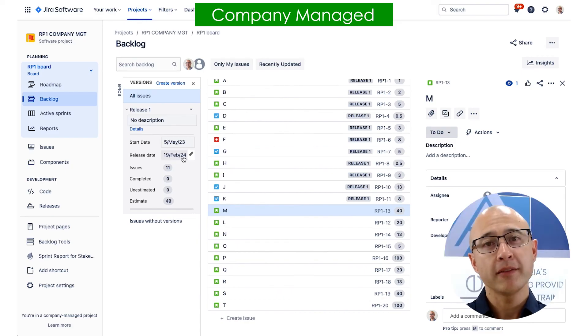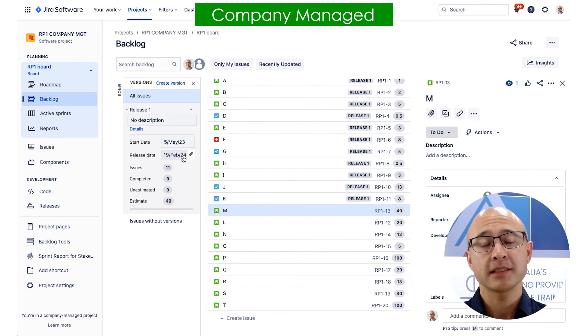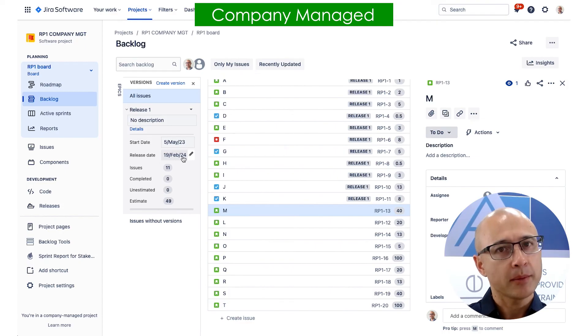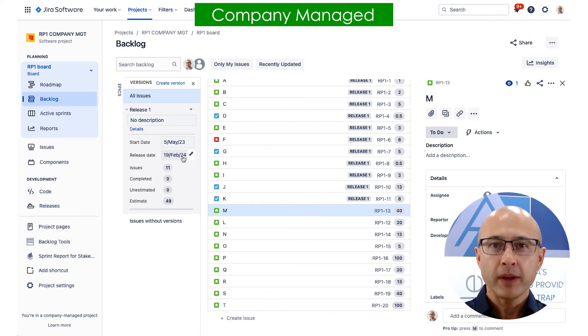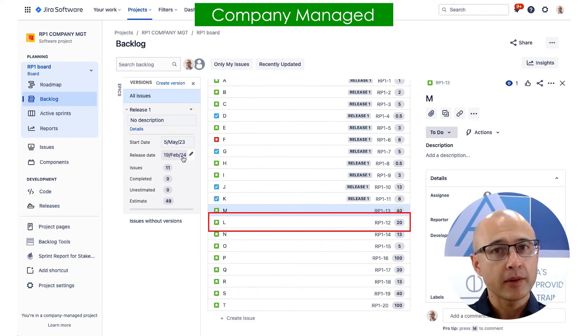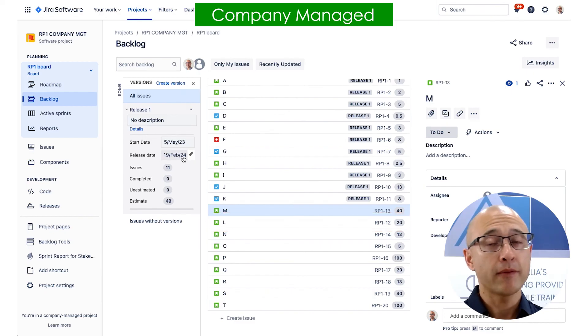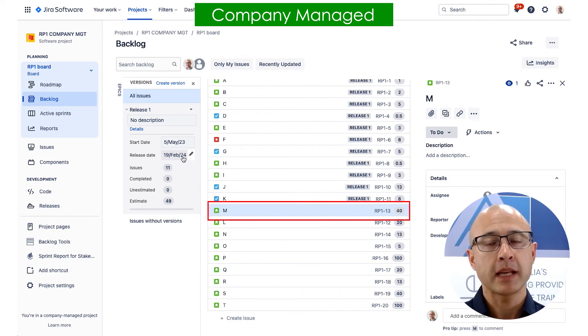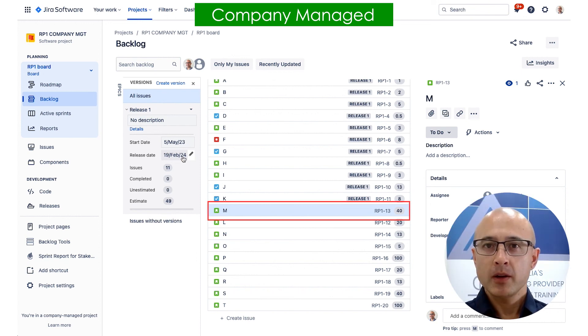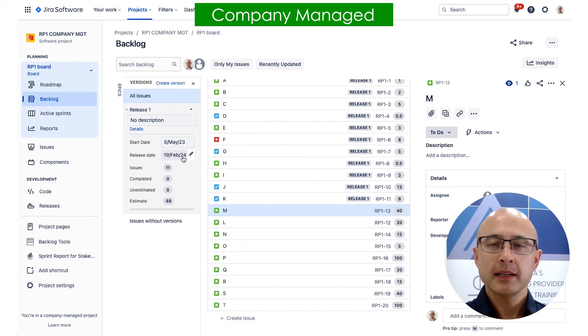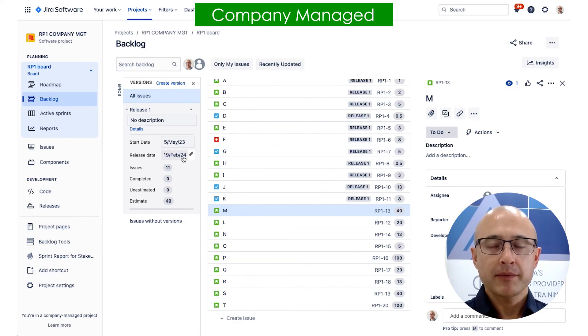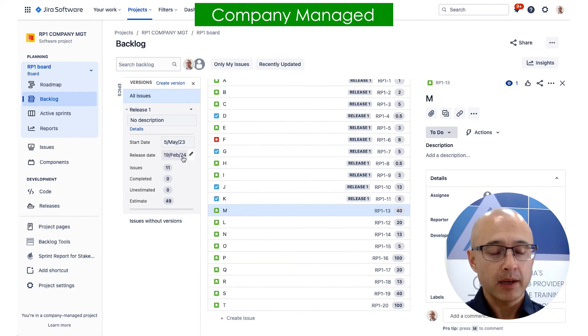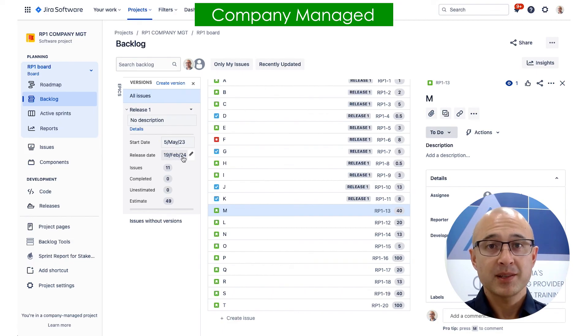Alternatively, we still do have a number of points remaining. If we take 49 points away from the 78 we had forecasted, we're actually left with 29 points. So what we could do is we could go down the product backlog and pull in another item or several items to fill up those remaining points. So for example, I could grab the 20 pointer there and put that in the release and then leave the remaining points just as a buffer. Alternatively, we could take the 40 pointer, break it down into smaller product backlog items, and then just bring in the product backlog items that we could fit. So that's how we would typically perform release planning. And don't forget, this is what happens at the beginning. But as you progress with your team, sprint after sprint, the release plan will need to be readjusted based on how the team's velocity is going. Sometimes that can fluctuate, but also your product backlog. The scope within the product backlog may change, and again, that's going to impact this release plan.